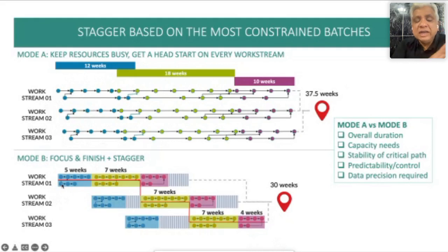Over here, delays start getting dampened. First of all, the only delays that matter are the ones on the red critical chain. The other delays get absorbed in these buffers. And these delays are not getting amplified. Worst case, they are getting passed along 1:1.